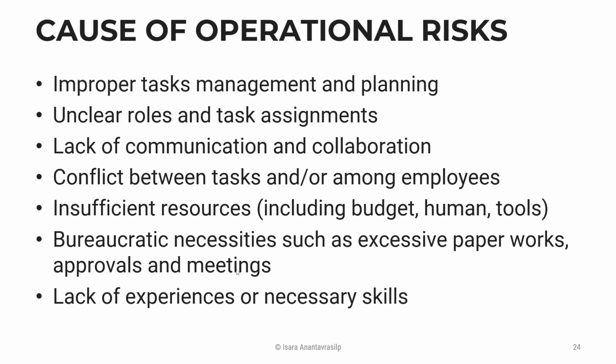Bureaucratic necessities such as paperwork, approvals, meetings, and documentation take a lot of time. So if you're working on a project with companies or organizations that require a lot of paperwork, for example, banks, government agencies, these kinds of organizations may require you to produce a lot of paperwork when you submit your project or during your project development, and you haven't thought about that.